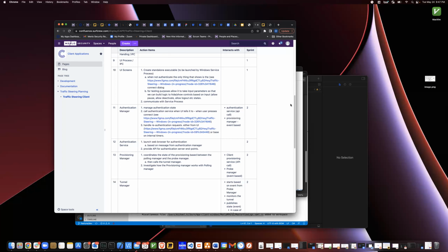The third stage, we start the end-to-end testing as well as fixing bugs. And the last stage, we will focus on wrapping up the application. I mean building the installer as well as the package in order to upload to the cloud as well.